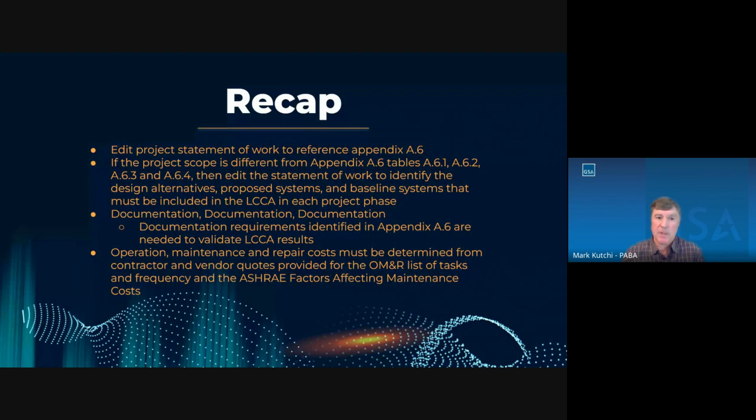And to recap, edit the statement of work to reference P100 Appendix A6, the life cycle cost analysis requirements. Again, the template statements of work do not include a reference. If your project scope of work is different, then revise that statement of work to identify the design alternatives, proposed systems, and baseline systems that must be included in the life cycle cost analysis for each project phase.